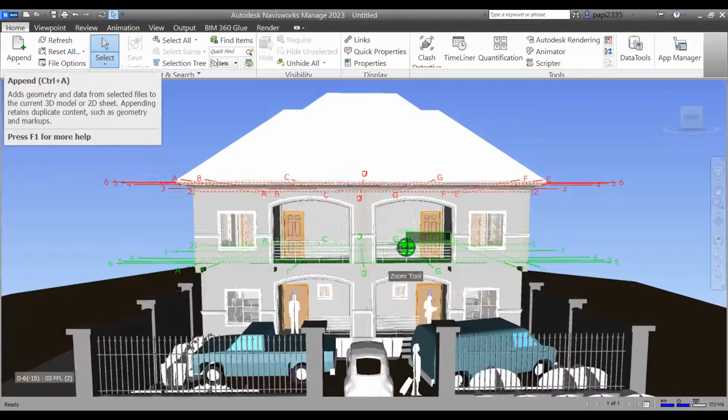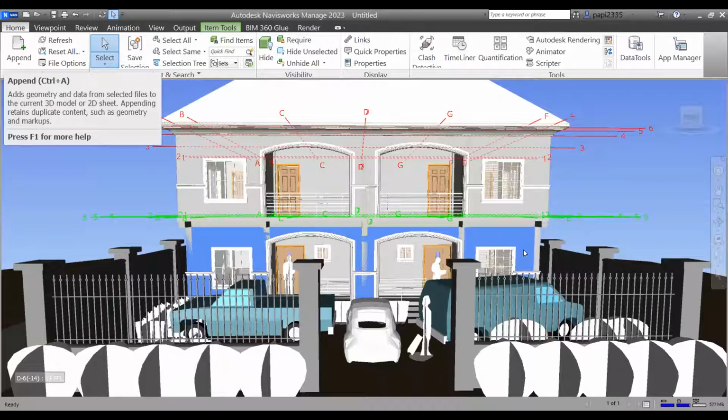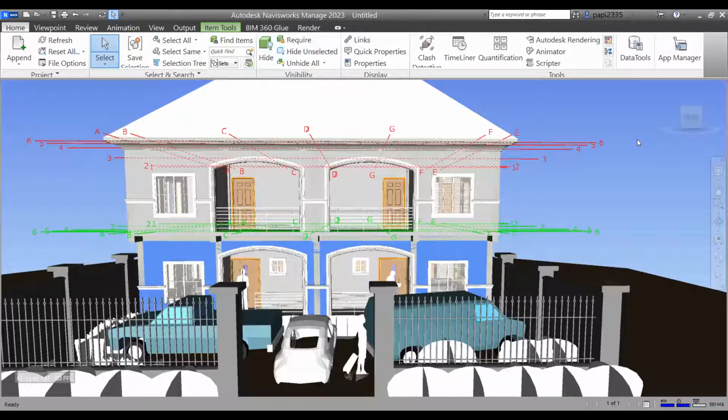So for us now, I also noted some questions that some persons were asking regarding how you're able to confirm the specifications that are there. And you must believe with me, just like QS Usman mentioned, that when you're discussing your BIM execution plan, that is where you outline some of these things. There is something called level of detail. The level of detail will define exactly the information that is available in the model at every stage of the development. When you are developing from an ordinary proposed design, schematic design, or what you call massing, to detailed design, there are bound to be additional information and definitions coming on top of the model. And he also pointed out to us that there is something called the properties panel. That properties panel can be enabled.